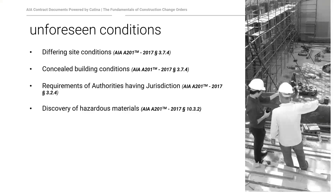Requirements of the authority having jurisdiction can also trigger change orders — changes at a permit review, retroactive changes in the law, or ordinances that impact the project. Code officials can interpret things differently, and those are legitimate change order requests if we had no prior knowledge of those changes. Discovery of hazardous materials — asbestos, lead paint, mold — is another common cause, covered in AIA A201 paragraph 10.3.2.